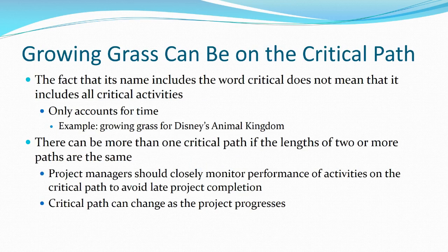It's important to realize, too, that when we talk about critical, the word critical sounds like it means crucial. Critical does not mean crucial. It means that basically it's the longest path through a project. That's all critical path means. It sounds like critical path is all essential potential topics or tasks. All critical path means is the longest way through.